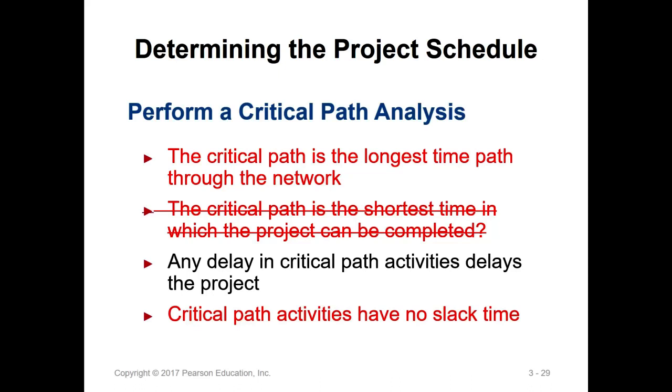So this one is not true: critical path is the shortest time in which the project can be completed. No, the critical path is the longest time to complete the whole project. And any delay in critical path activities will delay the entire project.